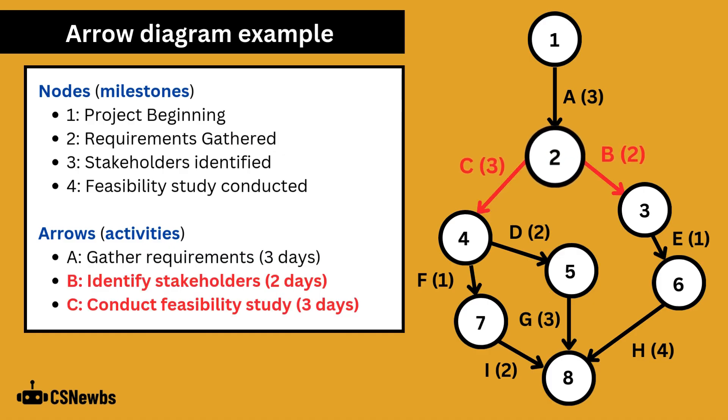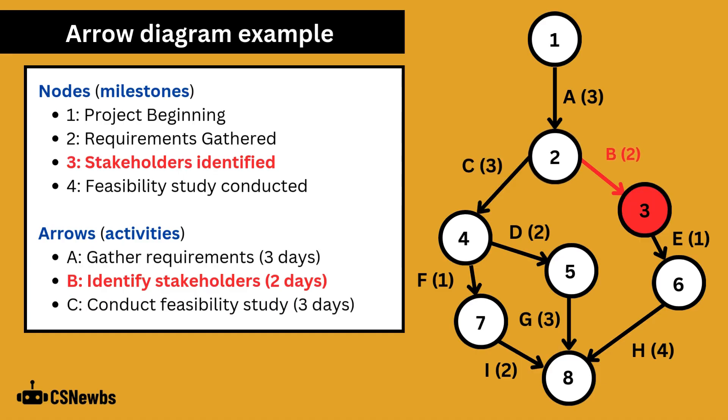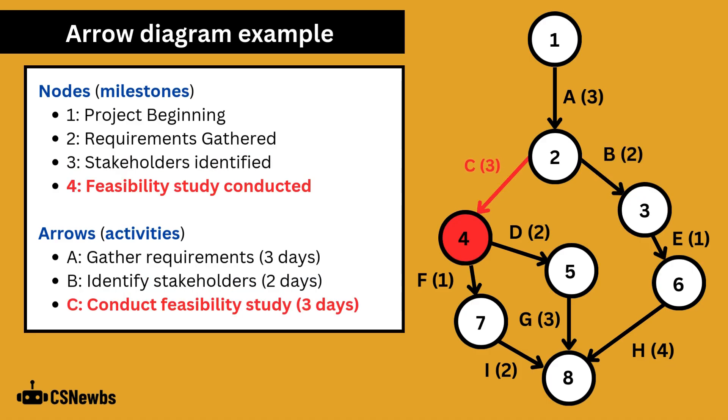Now there are two activities which could be completed simultaneously or separately depending on how the project is managed. Activity B is to identify stakeholders. It will take two days and take us to milestone 3. Activity C is to conduct a feasibility study and it will take us to milestone 4.